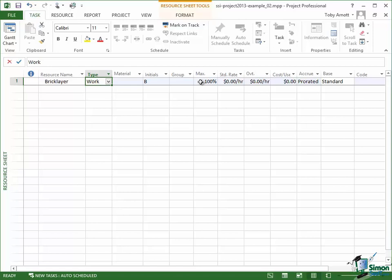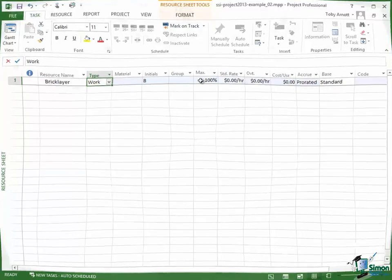But at the moment 100% means we've got one of these things. We've got one bricklayer. So when we come to schedule the building of the house having only one bricklayer may well turn out to be a very important thing.